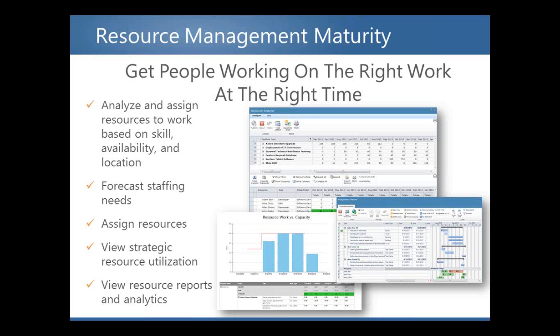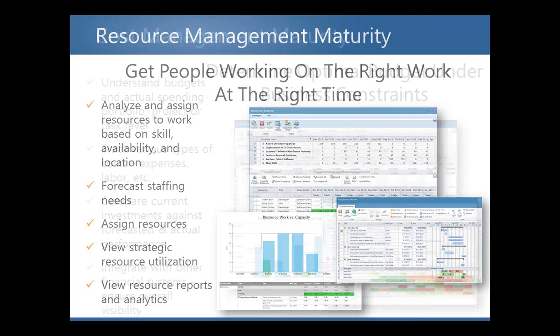And again, we've seen this evolve. Many more organizations are taking a top-down approach. How do you know which resource is available to work on what task? How do you know if they have the right skill set? Let's look at the top-down approach. So a project's been defined and you need to build a resource plan against it. You don't know who's available or who has the proper expertise, but you do know what role you need. You schedule 5 developers, maybe over the next 3 months, to work on this project. Now you want to see which developers meet the requirements of your project. The PPM tool must be able to accommodate your method of resource management, whether it's bottom-up or top-down, or maybe even a combination of both.